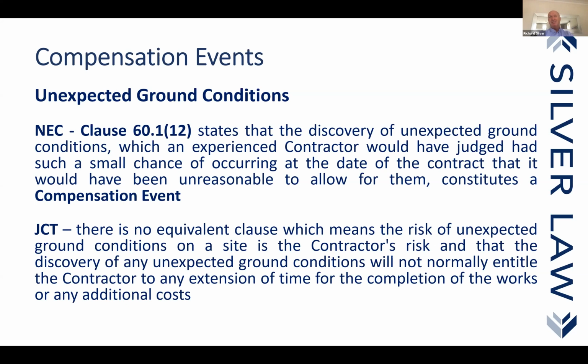What we're really looking at here is the design and build situation. Now, the contractor has to design the foundations and he takes on all risk. And if he finds the conditions are not what is expected, he has no claim. However, if the employer includes within the documents soil reports and or other information pertaining to the ground conditions and they are wrong, then there are errors and discrepancies in the ERs, and the contractor would be able to claim a change to the employer's requirements.